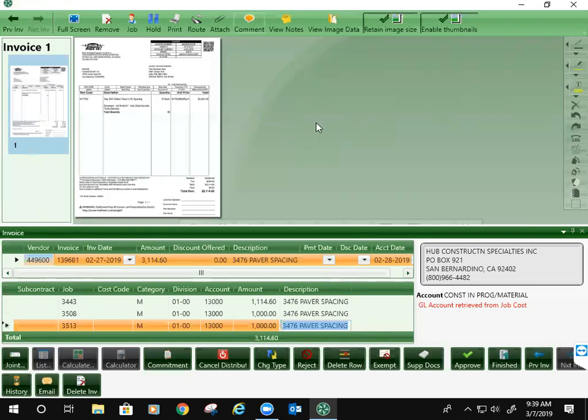Did you guys hear that? Mm-hmm. So on a subcontract, if they bill 50,000 and 1,000 of that is a change order that hasn't been issued, the header will be 50,000, the distribution will be 49. You'll have a note when you open it up, a comment that says, we can't process without change order 4. We'll have to get that change order approved into Timberline. Then once it is there, then we can allocate 1,000 to that change order.